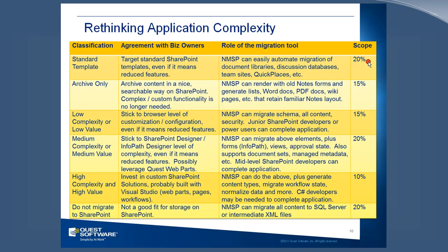But the point is, it varies so widely. We can migrate some applications very, very quickly and others are going to take longer. So it depends on the application, it depends on what you're migrating, it depends on what features you're using, it depends on how many formulas you're using to select the data, and so on. So we don't tend to publish those numbers, but the point is you can test this in your environment and it can be very predictable once you've got some benchmarks. These simpler ones, you have very little upfront design work or design migration work. You do a few tests, and then you measure the volume, and then you can predict those very, very easily.